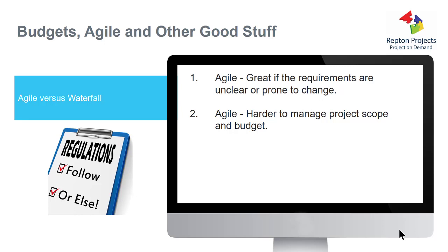With Agile, it's much harder to manage that project scope, and of course trying to keep track of the budget and not necessarily knowing what you're doing next and how big this thing might get. It's very difficult to run the budget in the same way with Agile, and all you can do is to fund yourself around a number of sprints that you're expecting to be able to finance, and expect that you'll be able to get your final end product deliverable out of that.